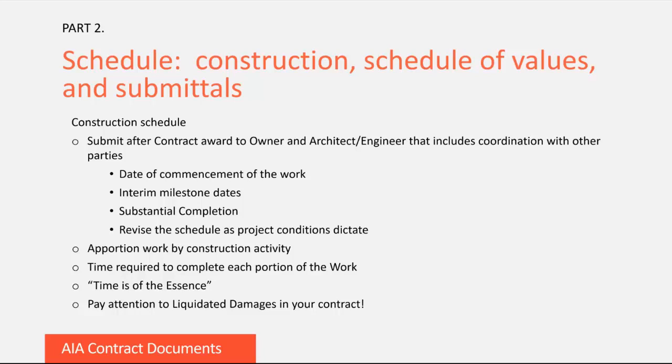Time is of the essence means that timely performance is an express condition of the contract, and any delay in the owner's or contractor's performance constitutes a breach of contract. Now, you don't need to address this on your schedule, but do pay attention to liquidated damages in your contract, as these will be assessed if you fail to meet substantial completion within the contract time.